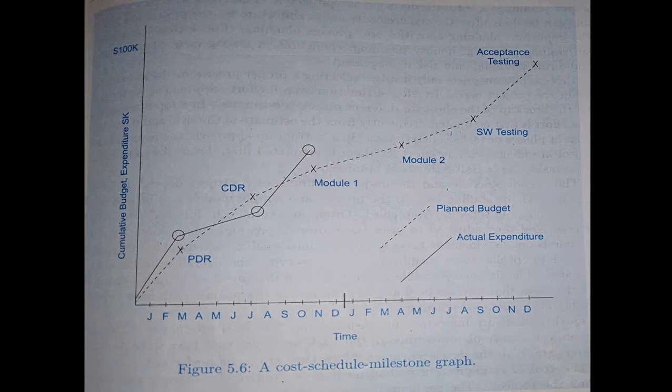The graph clearly illustrates how the project progresses in every stage. The actual plan is represented in the dotted line, and the achieving goal is represented in the solid line. If there is any difference, the graph clearly shows whether the project is moving towards the achieving goals or not.